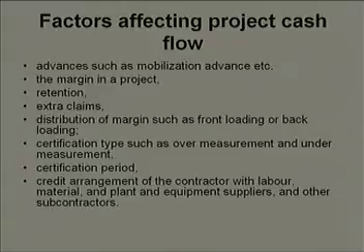Then the second factor is the margin. Margin is your profit on your cost. So, this also affects. If your margin is 10%, your project cash flow diagram would be somewhat different. If your margin is 15%, your project cash flow diagram would be different. If your margin is, let us say, 5%, it can affect the project cash flow diagram in a different manner. So, these aspects we will be covering. We will take a fictitious example for each of these factors